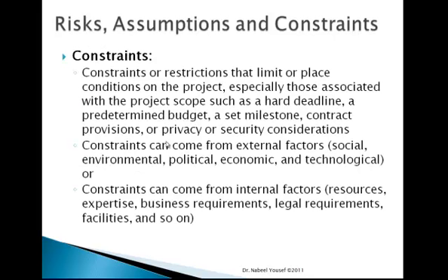Constraints are restrictions that limit or place conditions on the project, especially those associated with the project scope, such as a hard deadline, a predetermined budget, set milestones, contract provisions, or privacy or security considerations. All these are considered constraints or restrictions.